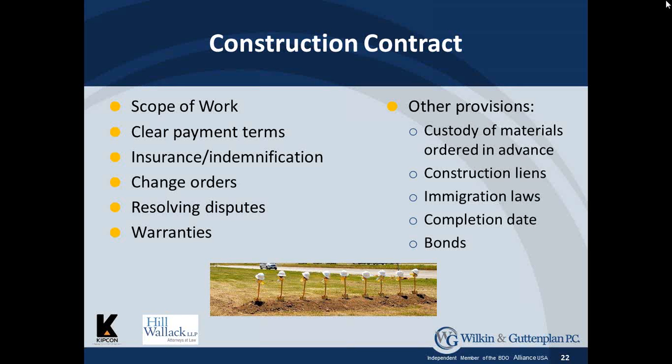This is also why you have retainage, an amount that is withheld from each of the payments pending final acceptance of the project. The final issue I will touch on is bonding. Performance bonds cost money, but if a contractor fails to complete the job and leaves town, you will at least have recourse. A performance bond is not a warranty, just a completion guarantee. In other words, if it was completed but in a short time thereafter shows a deficiency, that would generally be a warranty issue, not a performance bond issue.